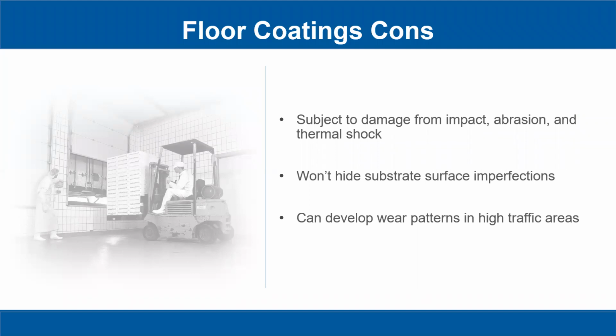So that's when we have to educate that client and that owner and let them know that for $3, they're going to basically get a coating that's going to mirror through, telegraph all those chips and divots. So you're going to have to go patch all that with something, and that's going to add cost, okay? So when you enter with just a coating, you really want to be applying those on bare, good, new concrete, and educate the owner that you're going to get a few years out of them life cycle.